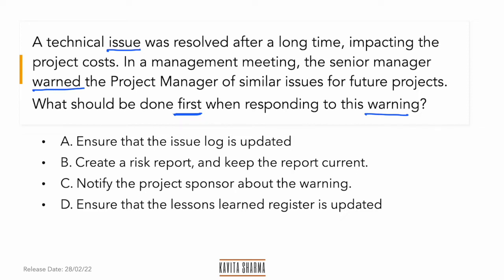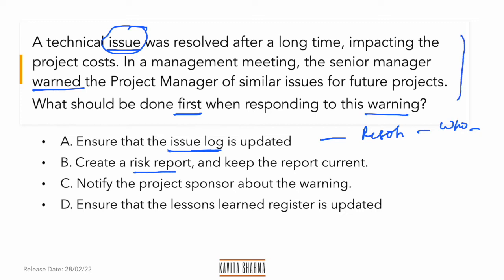Let's look at the answers. 'Ensure that the issue log is updated' — since there was an issue, I need to ensure the resolution, what happened, who did it, and what should be done to prevent it. This should definitely be done. 'Create a risk report' — have you seen the word 'risk'? You saw 'warning,' which may trigger the word 'risk,' but this is not a risk that happened; we're talking about an issue. So this is not the right answer.